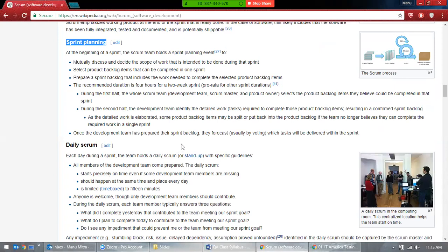There will also be how much time is allocated for each and every user story. Here the developer has an advantage because they know the technical information, what the issue is, and what they have to fix or develop. So they will be talking more. Then they will have a kind of voting session: this is the story, how much time will it take? The developer says 5. That means 5 days, which includes 2 days for testing and 3 days for development.